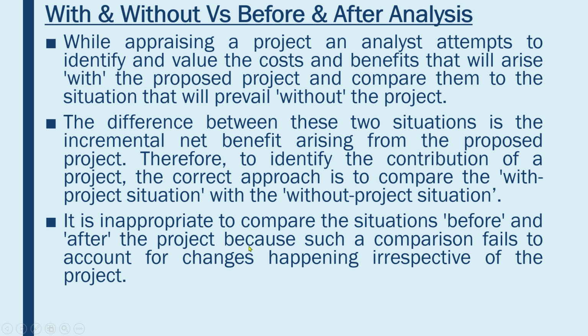Because this benefit cost analysis is basically done before starting the project, and before and after means you are comparing it after the closure of the project. That would not be appropriate at this stage when you are doing the project analysis before the start of the project and you want to propose to your boss. So before and after analysis would be good after the closure of the project for lessons learned, but not at this stage.